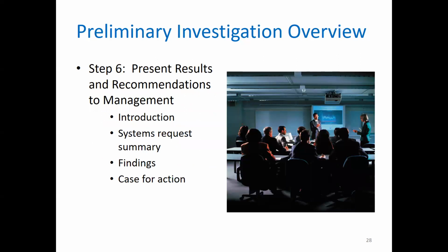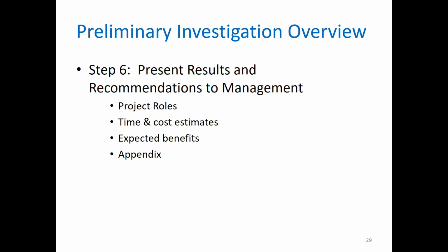And the information can be presented and recommended to the management in terms of a format laid out in the slide: introduction, systems request summary, findings, and the case for action. And within the report, you will also list down project roles, time and cost estimates, expected benefits, and the appendix.